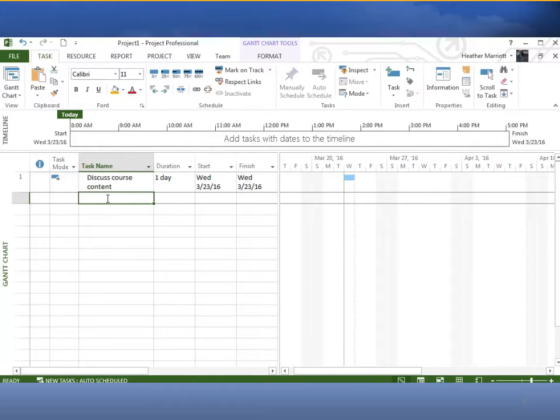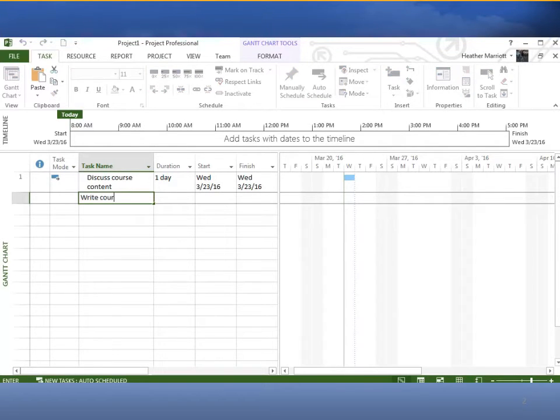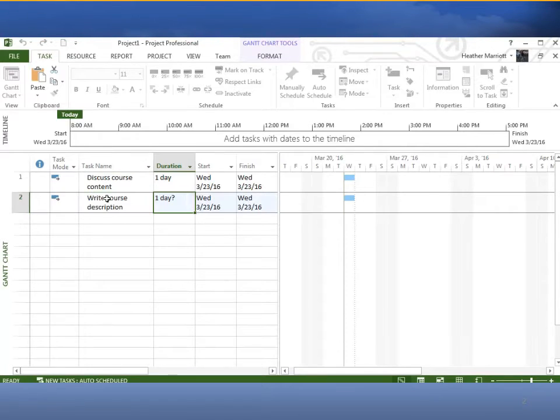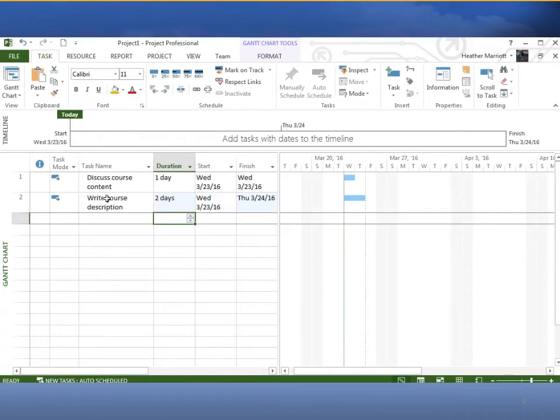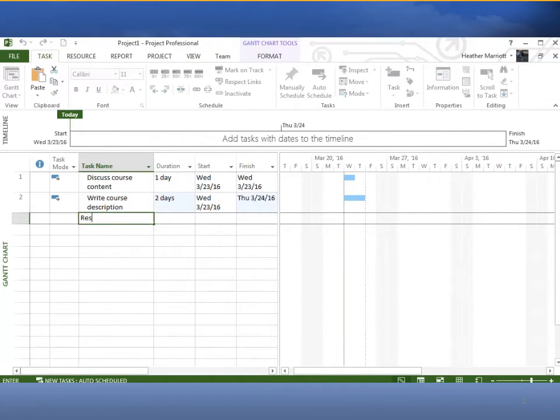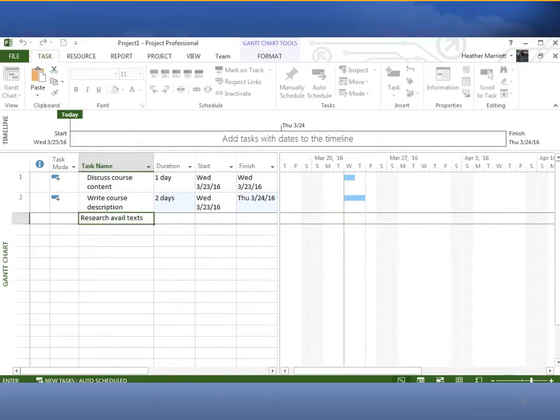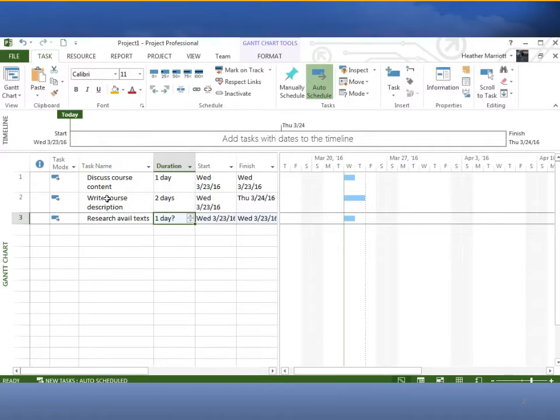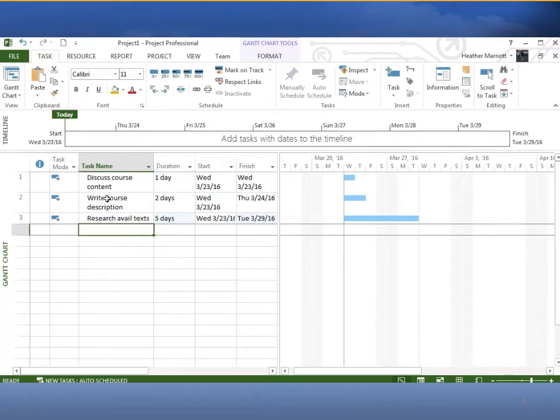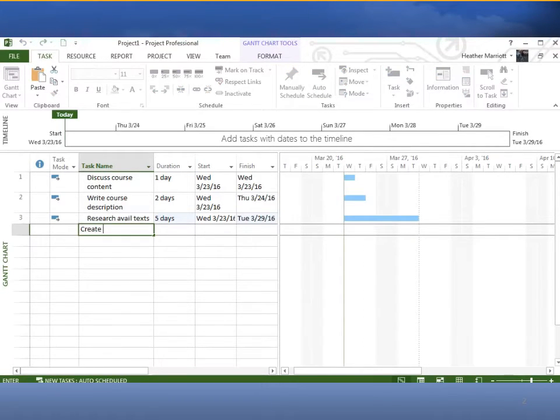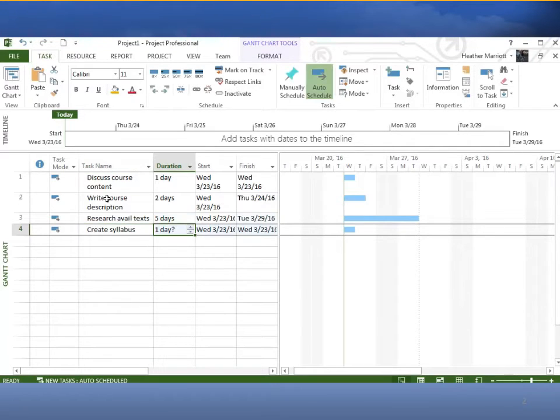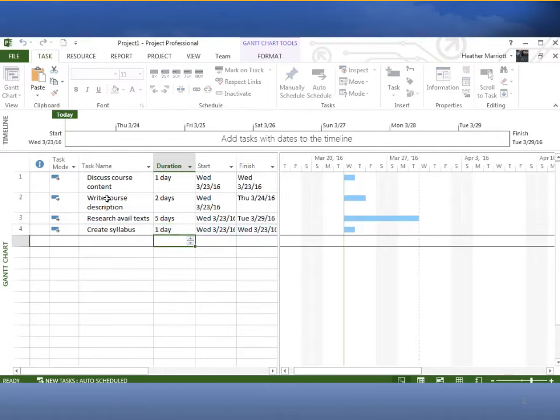Our other tasks were write course description, and we'll say that takes two days, and then we've got research available textbooks, and that took five days. And we've got create syllabus, and we were told that it takes one day and that there were some relationships here.